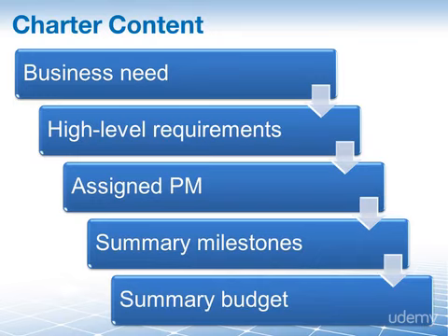As you can see from these five items, you are going to have to be pretty high level at this point. Not surprising. The charter is one of your first documents and not much detail is known yet. You should also not forget that the develop charter process is repeated in every phase of the project. That way you can revisit the charter and make sure that your decisions are still valid, and it can also serve as a stage gate to approve the next project phase.